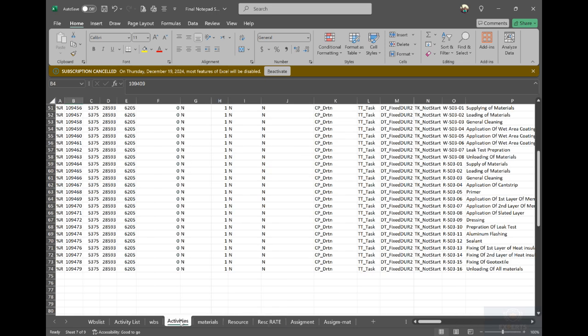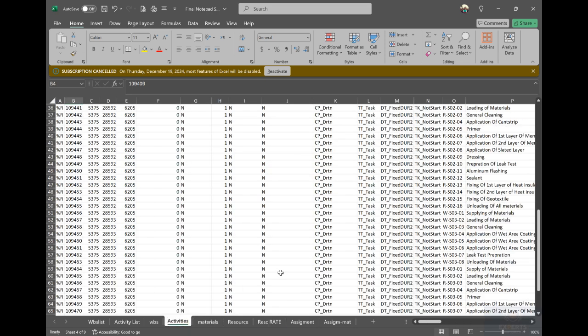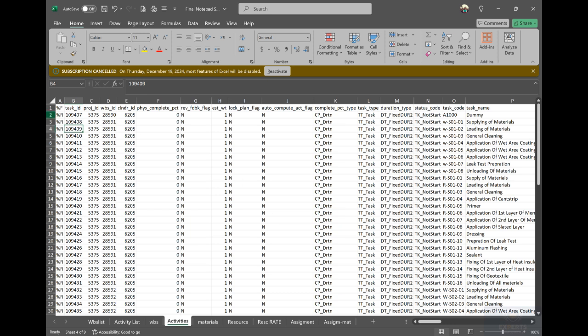So I will go here and check the activity. How can you define the activities? Also I will go to Notepad and take a copy. It will be named tasks. I take the copy and it appears that I have only one activity, which is a dummy. These two rows are coming from Notepad, which came from Primavera. You will find the task ID. The task ID is the activity ID, which is given by Primavera, 109407.